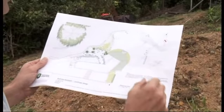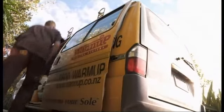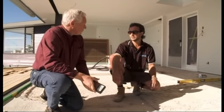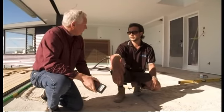Meanwhile, back to my troublesome underfloor in the main living area. We were waiting on the results of a moisture test before we could embark on doing the whole job again for a second time after my rogue guy botched the first job. Max Tomlinson from Seeker is using a Seeker Tramex device that measures the moisture content in a concrete slab. We're hoping for moisture content results below 4%. And it seems that something to do with this floor is finally going my way.